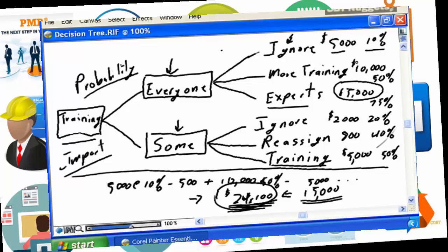There's a degree of imprecision related to the degree of probability that this is the appropriate action you're going to take. You need to ensure you have sufficient contingency in hand to deal with this risk should it happen on your project. But, and this is a big but, you also need to ensure that you're not building in so much contingency that this number is so conservative